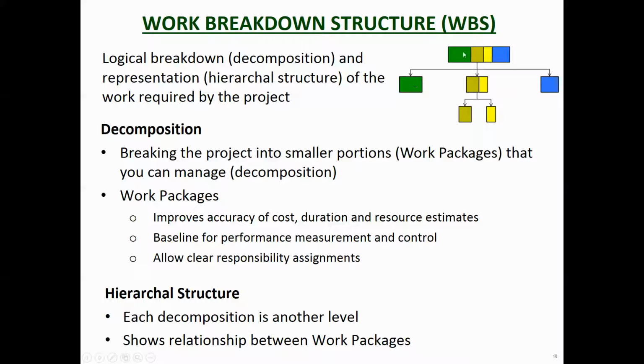So now we've got the foundations separate from the structure, and then we might break that one down into the columns and beams. Okay, so that's what it is. It's breaking it down. That's what decomposition is, taking that thing there and breaking it into these work packages. So the work packages are the lowest level of the work breakdown structure. They don't need to be on the same level. They're just sort of the end of the line, if you like.